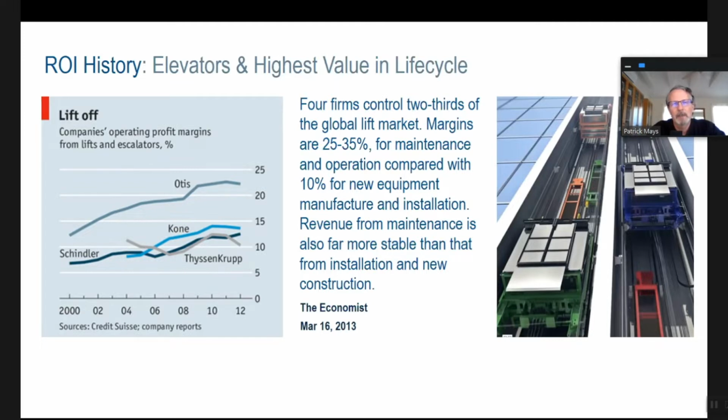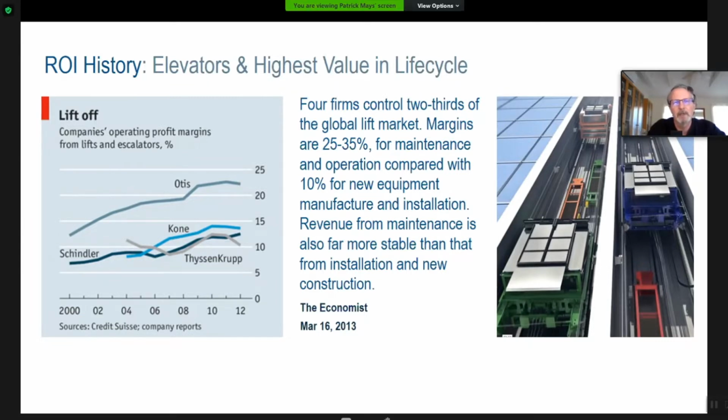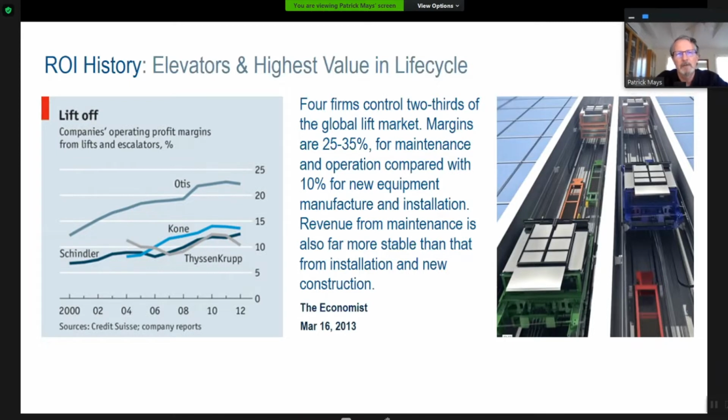When I was in San Francisco working on high-rise projects for Trammell Crow in the early 90s, they said to me, just leave the elevators out of your documents. Just put a bubble in your drawing saying provided by others. And likewise with the contractor that was a PCL, they said, you know, just this will be provided by others, just leave it out of your contract. We're going to buy elevators from Otis for 5 projects that we're doing in the region over a 2-year period.